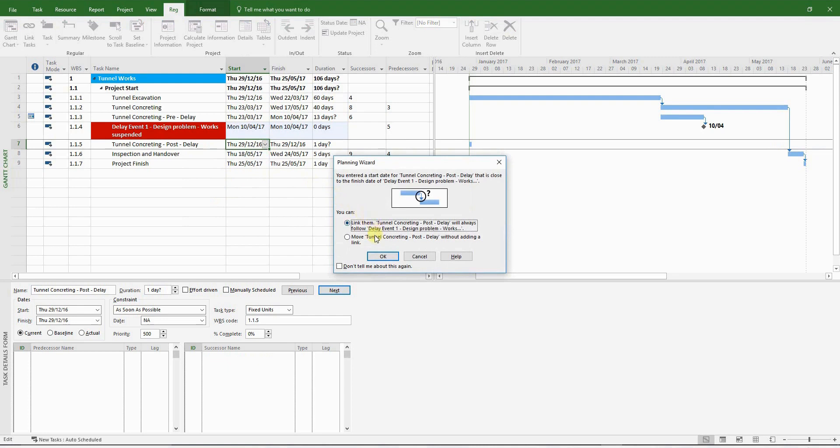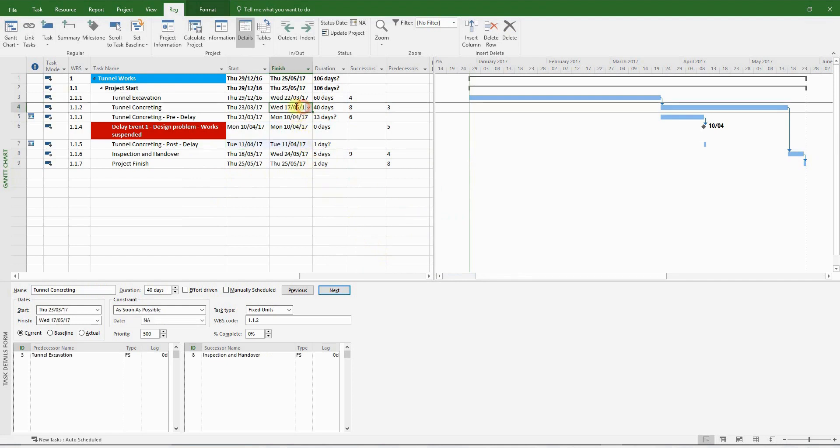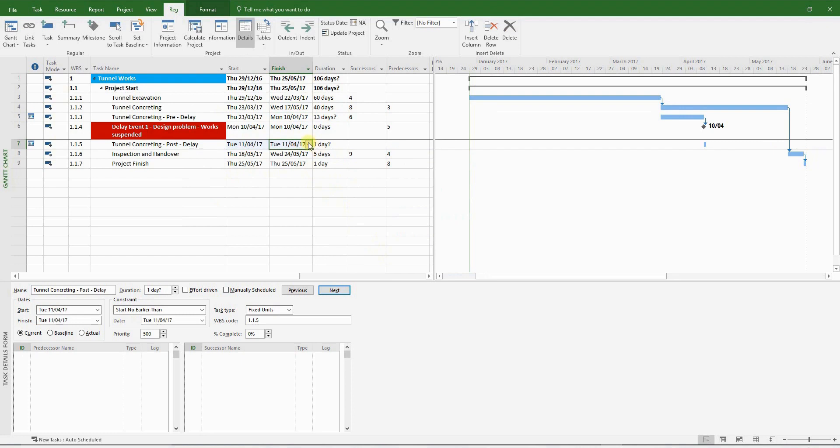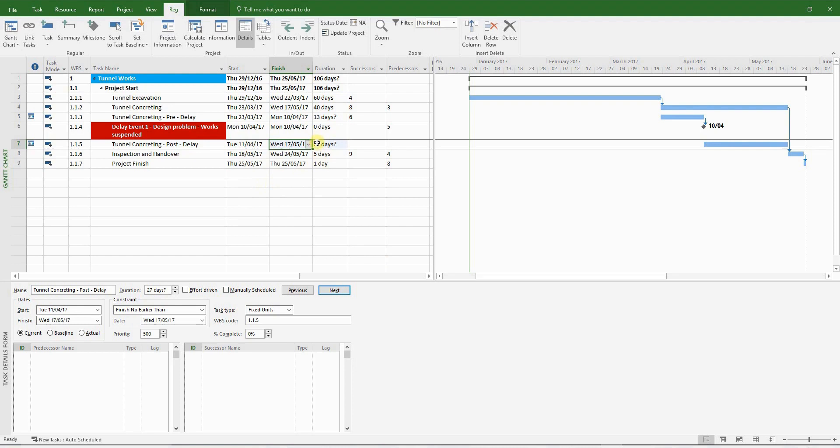Choose the second option, which is moving the activity without adding a link. Now we have to enter the finish date for the tunnel concreting post-delay activity, which is the 17th of May 2017, giving us a duration of 27 days.